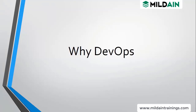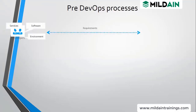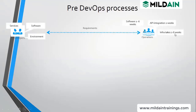If we see a pre-DevOps process, we have developers, software environment, services, and requirements. In pre-DevOps, software development took two to six weeks, deploying software took two to three weeks, API integration took two weeks, and infrastructure took two to eight weeks. So it was taking too much time overall.